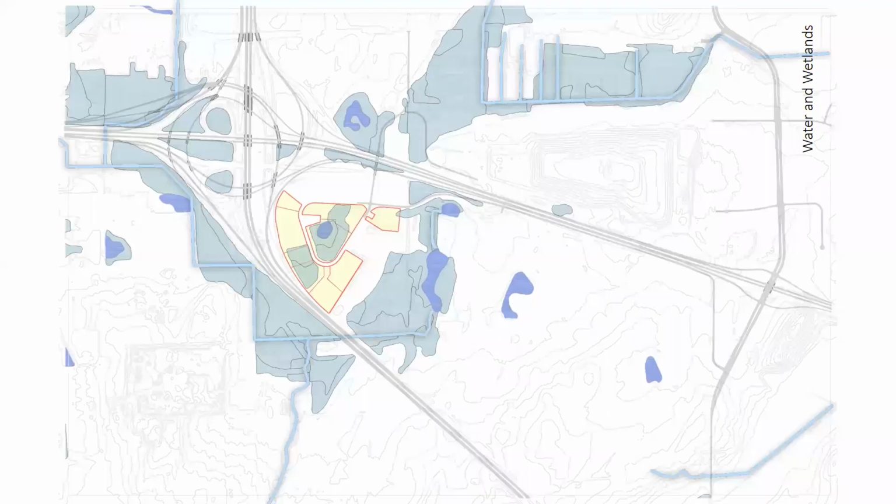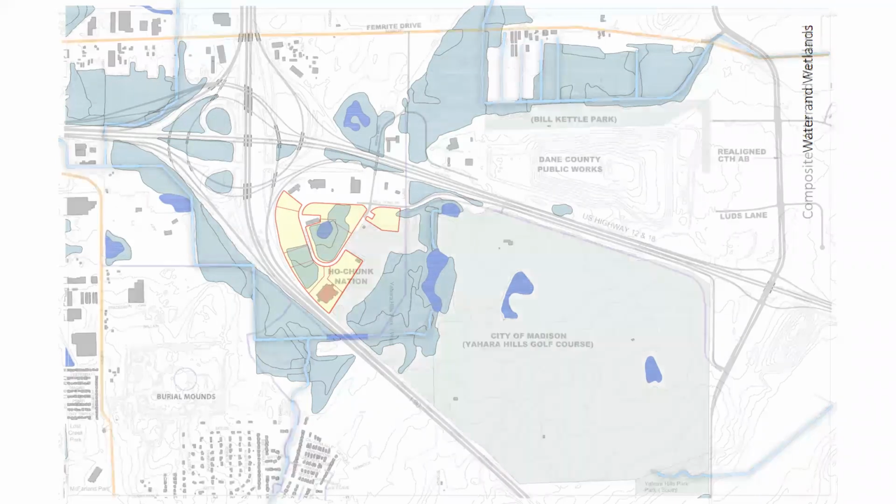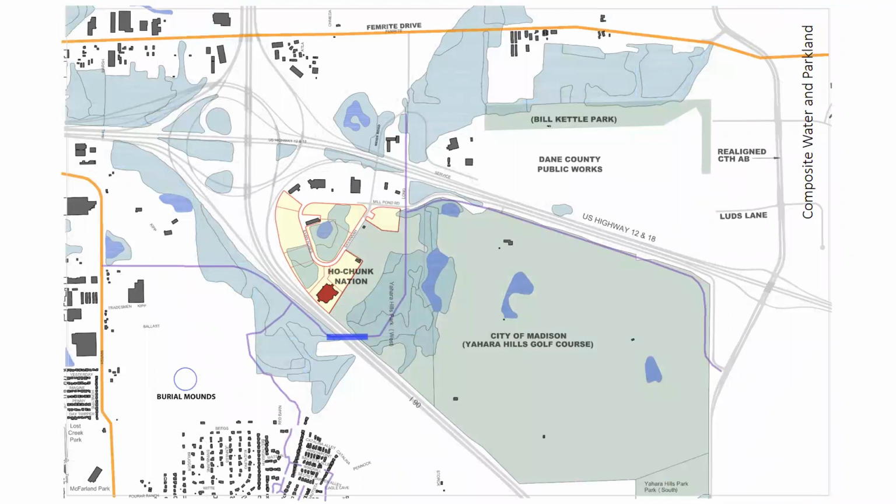Here is a diagram of the wetlands. So immediately they saw that almost half of their property was in wetlands. And so that was a surprise to them. They didn't understand at first the implications and impact of that. There's a whole jurisdictional process for changing sites from wetlands. You can do it, but the obvious goal would be to preserve as much as possible.